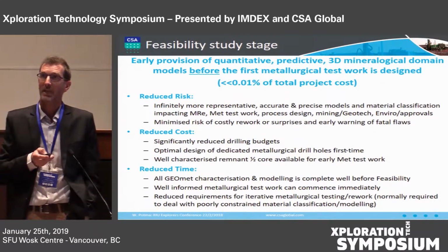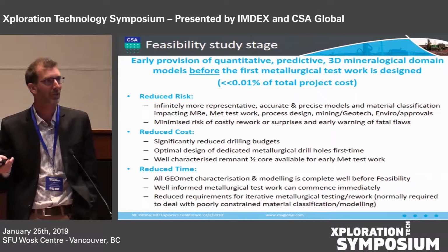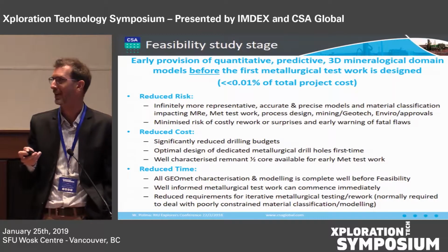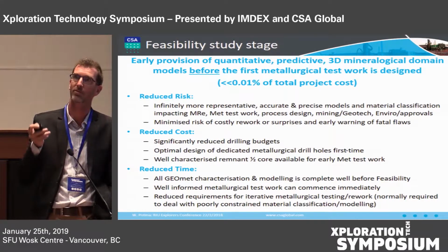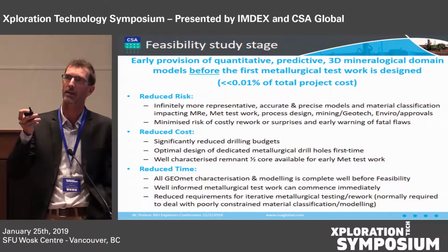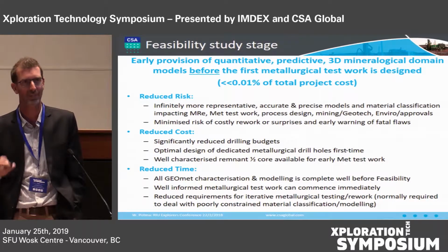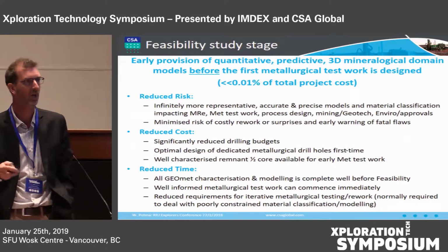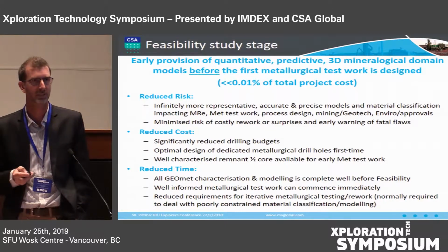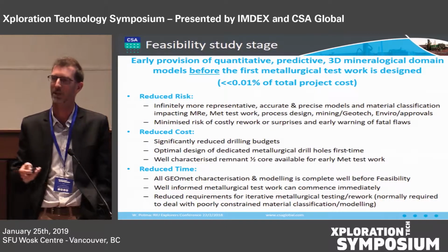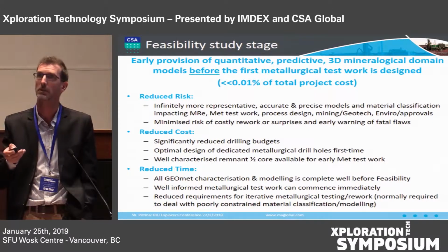So, at the feasibility study stage, this is where people start to think, now we really need a good geological model. Well, you're too late. You should have had it a long way before this. And if you've been collecting the right data, you would have had it a long way before this. And if you had those data, then the time to go through that feasibility process, get the metallurgists on board, get the engineers on board, get your block model filled with the sort of data that can contribute to optimising your feasibility study, optimising your mining studies, optimising your met test work, would all have already been done. Okay?